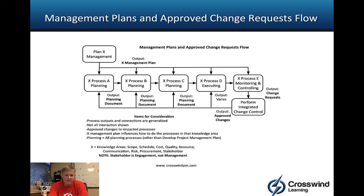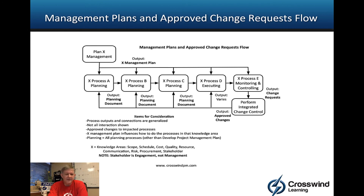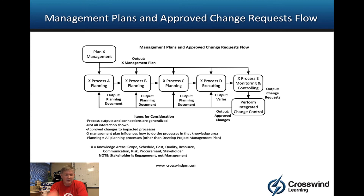All planning processes other than Develop Project Management Plan would potentially be updated by or work under the guidance of the respective Plan X Management process. So if X is scope, all scope planning processes would be updated; the same applies to schedule for schedule, cost for cost, and so on.